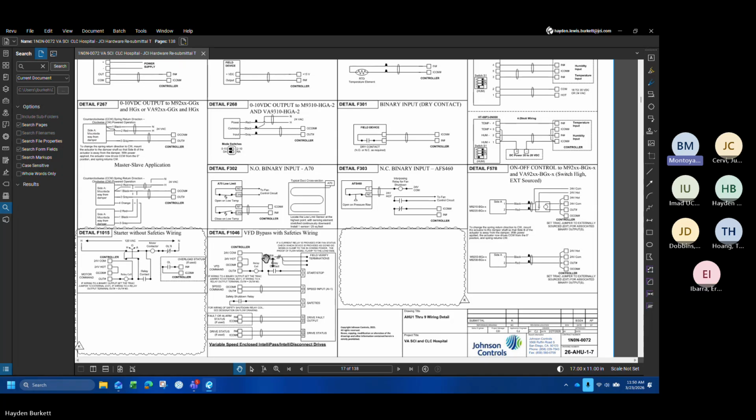The contract has specific submittals that will go to the VA for our input directly. If it doesn't require VA input, then whoever the SRE is at the time can maybe do a spot check, or if they want to look at something specific. But we rely heavily on the mechanical DOR and the team to make sure that everything gets ironed out.